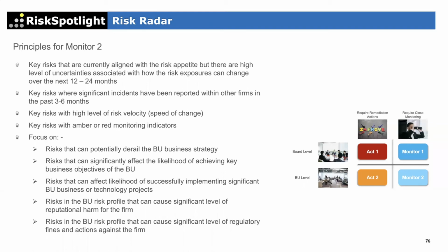Okay. So those are examples of criteria, because in terms of risk assessment, maybe only that first bullet point talks about risk assessment, but that's not the only way you have to escalate risk. Maybe the risks may be green, but because we are proactive, you want the risks to be managed while they are green. You don't want to wait for those risks to go from green to amber and amber to red, and only then you escalate and do something about it.